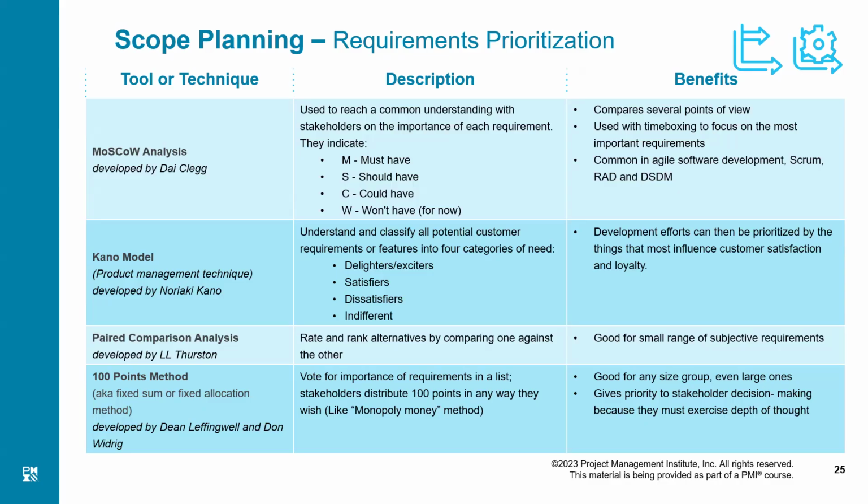When we are voting, we have to ensure that all the 100 points have been expended. So you may have given all the 100 points to one item, and there is another person who has divided them: 60 points he has given to one option, and 40 points to the second option. He did not consider the third option. So this is the 100-point method.